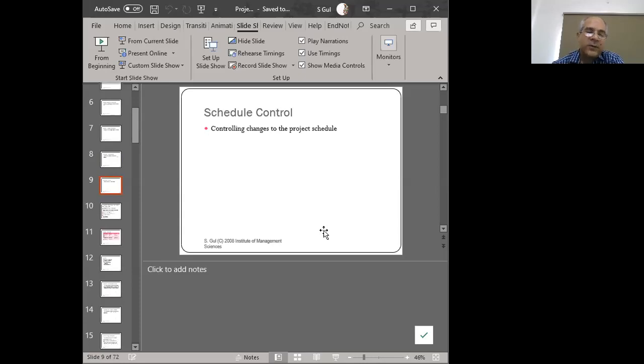Now, there may also be a case where the reality is ahead of the plan, meaning that we thought it would take 3 days to do something, but it took us 1 day. That is also going to be a concern for us, because in that case, we're going to wonder whether there have been some quality compromises, or is it the case that a certain amount of work was left incomplete, right?